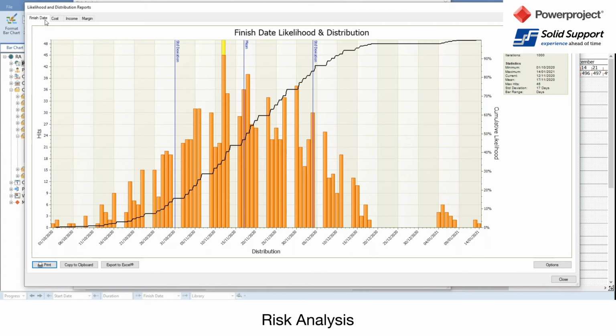And as I said before, you could take a project that's come from another system, run a risk analysis, and produce these risk reports. You could share this information. If you ran it on a subcontractor view with only one certain subcontractor, you could do a risk analysis on all the activities that subcontractor is working on. So you can really go to town on this.